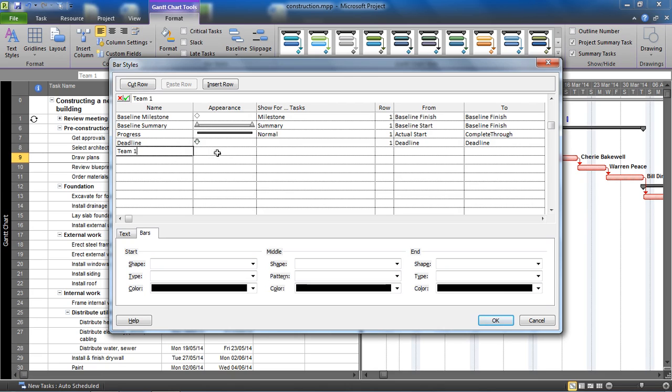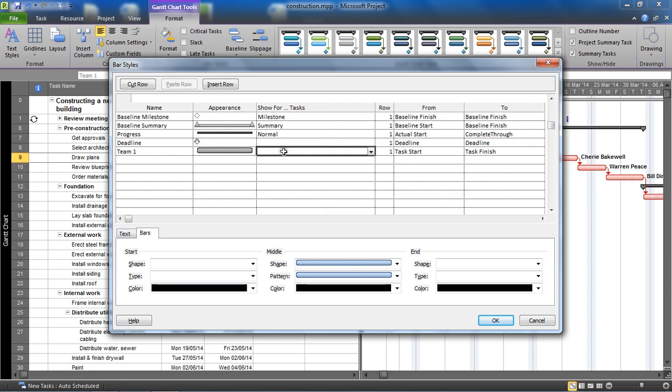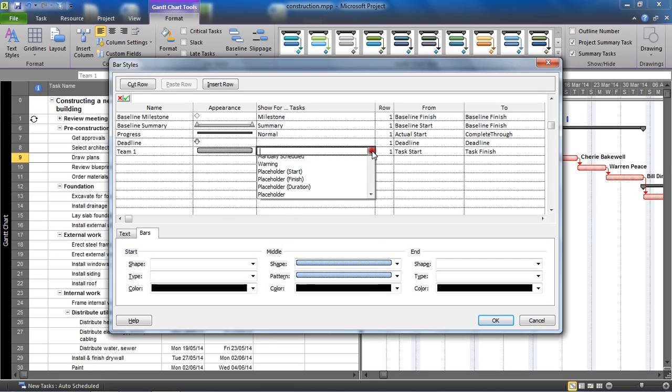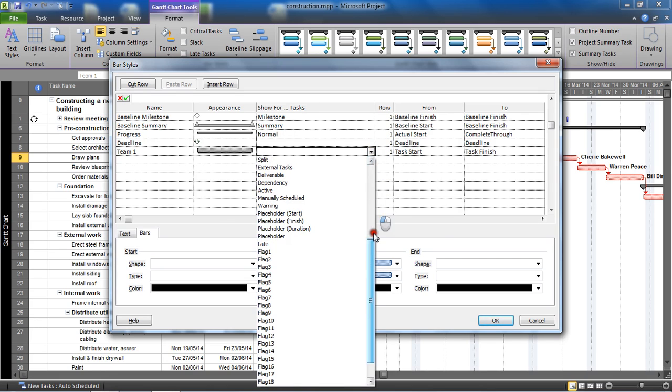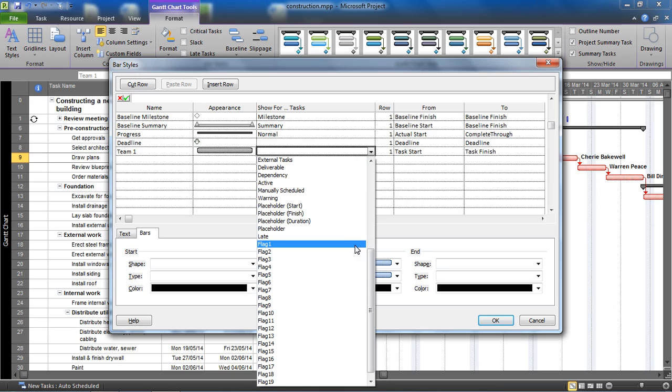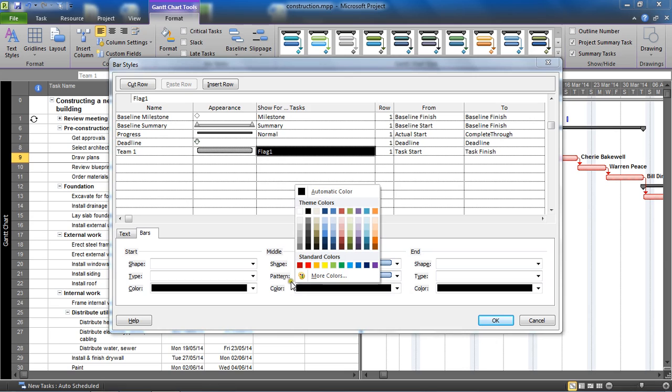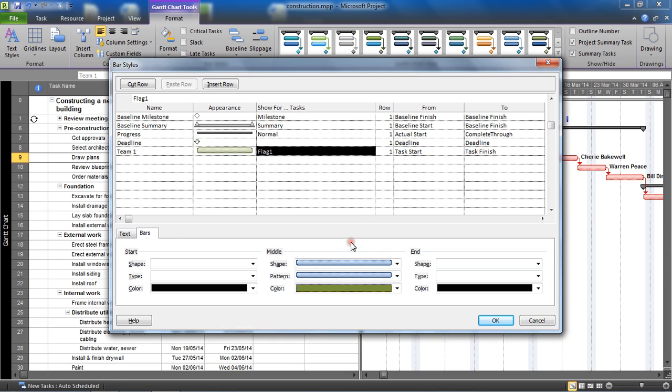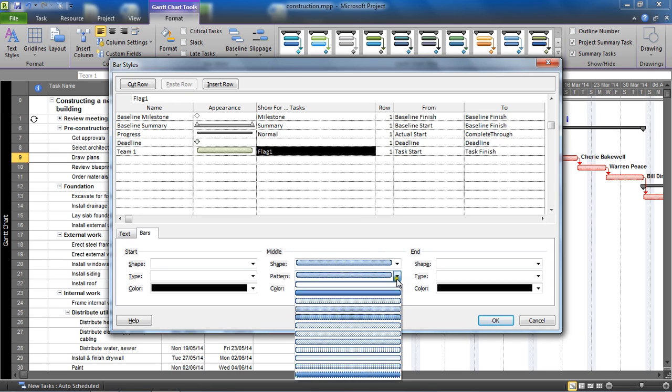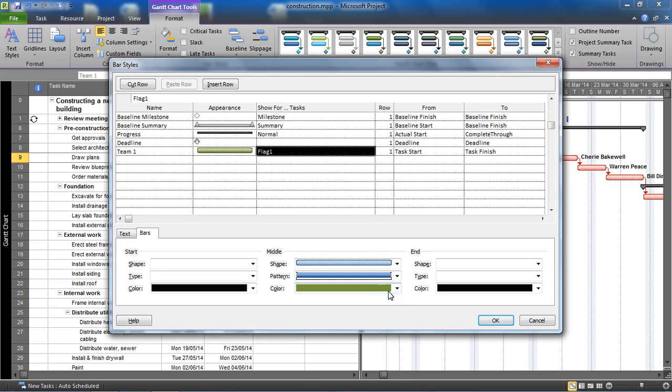So first, name of bar style: team one. Appearance: show for what tasks. I'm going to use this drop down list and choose flag one. Flag one is what I've used for team one so I'm saying use this bar style for the first flag. If it says yes, use this bar style. It's currently this black color. I'm going to change the color in this middle section at the bottom here to the color of my choice. I'm going to ask it to display green, always change the pattern to a more solid color as well. Display green if they're from team one, your flag one says yes.